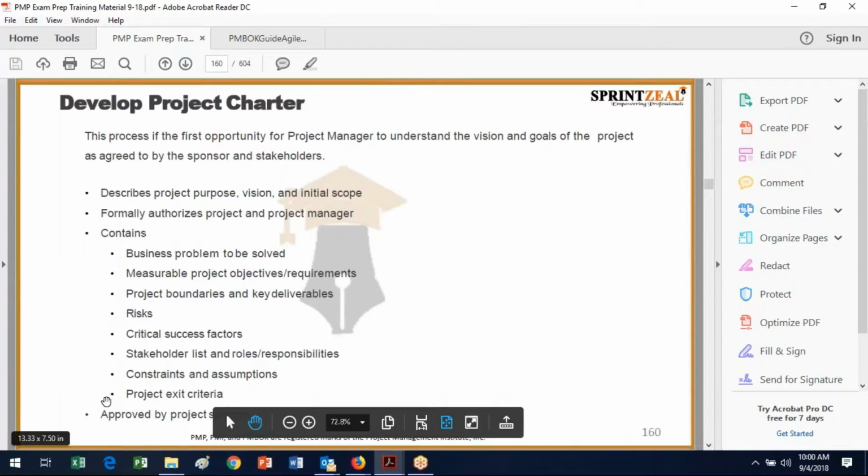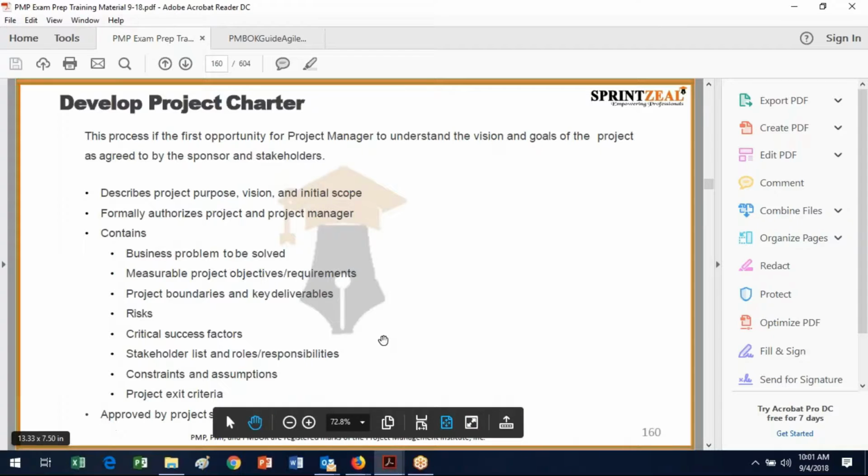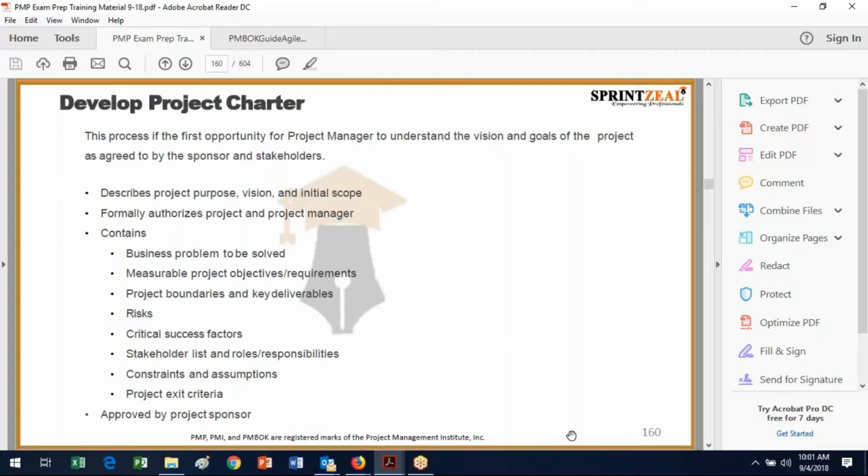We talked a little bit about the phase gates, what might stop us from continuing this project, and what actually says we've successfully completed the project. And then the project charter needs to be approved by the project sponsor. So as you said, needs to be signed, and again, is pretty much set in stone. You really need to go through a formal change process, and as you said, in your corporate world, an addendum to change that project's charter.